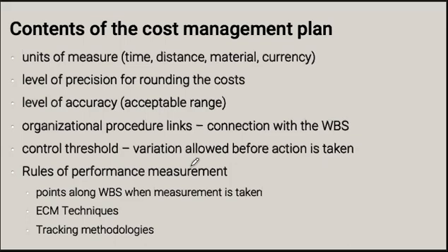It should be EVM, sorry for the typo. We're going to be looking at the earned value management techniques, and how often and to what extent we're going to be applying those techniques, and tracking methodologies for costs. We're also going to look at some thresholds and some benchmarks, so positive and negative variances. We're going to look at who's going to be approving the costs. So is it the guiding committee, or is it the project manager? Is it the sponsor? Does it have to be within the organizational management, and so on? Templates, who are the stakeholders involved in the costing, and so on.